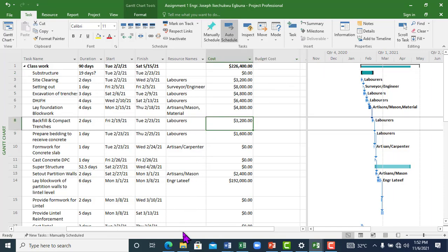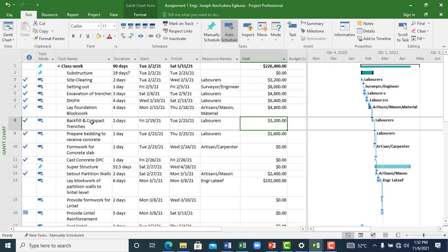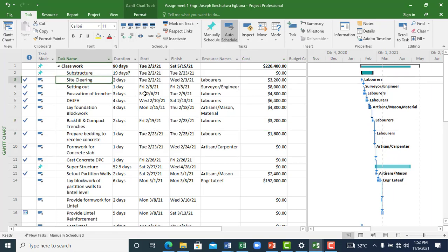All right. So basically, what this tells us is if you have an activity that you have a particular value for, if you are deploying that engineer on that activity, and that is the only thing he's doing for that day, and the cost you have on that engineer, for instance, how much you are paying him per month, you divide it into weeks, you divide it into days, you know the cost implication of that engineer for you per day, and you assign it to a task, and the money on that task is even more than how much you are paying your engineer.